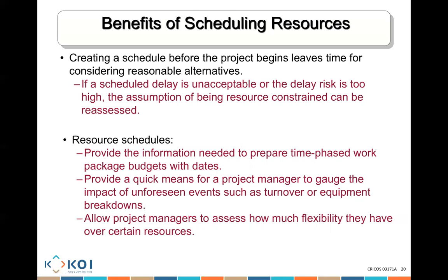Resource schedules, guys, provide you with information. When you know when the resources are going to be used, you'll be able to start considering the budget. Because if I know that Fadi is going to be working and teaching ICT712 on a Tuesday between this time and this time, I know that during this time and this time, I need to be paying Fadi. So it tells you when you need the budget to be available, and it corresponds to when that task is going to be started.